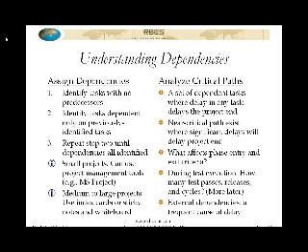Now, that's called a finish-start dependency. We have to have finished the predecessor before the successor can start, but you can have variations in that, like a finish-start where the successor can start a day before the predecessor is actually finished, so some portion of the work has to be done. There are a lot of different variations here, but ultimately we're talking about tasks that are somehow linked with some sort of dependent relationship.